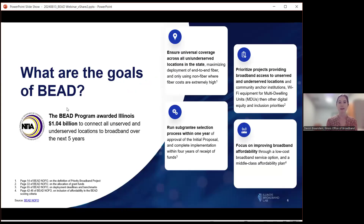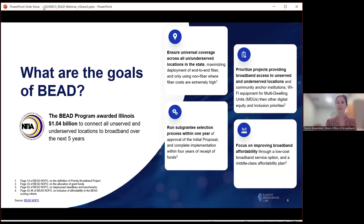Some more specifics about Illinois' allocation: the goal is to ensure universal coverage across locations statewide, per NTIA requirements. We are prioritizing fiber connectivity where feasible from a financial and technological standpoint, but also encouraging all technologies to participate. We'll prioritize projects first based on their status as unserved, then underserved, and then community anchor institutions that are eligible. We'll run the sub-grantee selection process within one year of the initial proposal approval, and then focus on broadband affordability by requiring affordable broadband options.